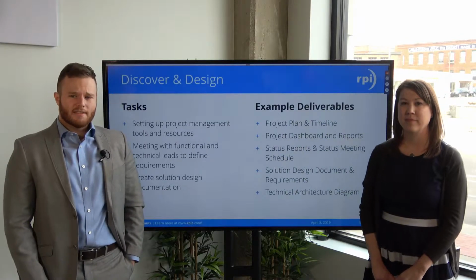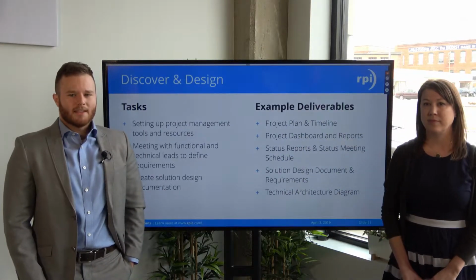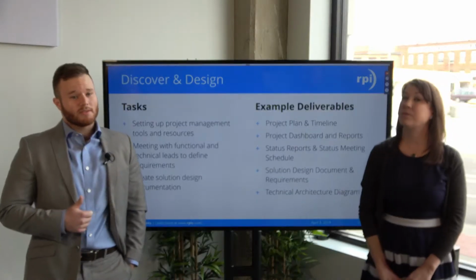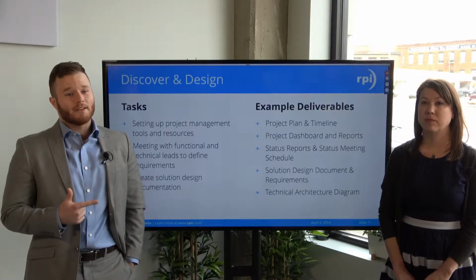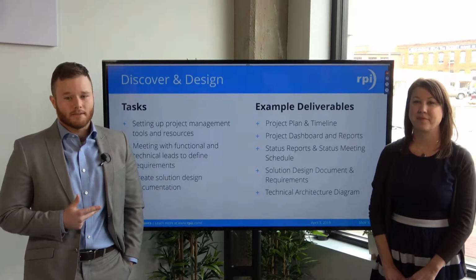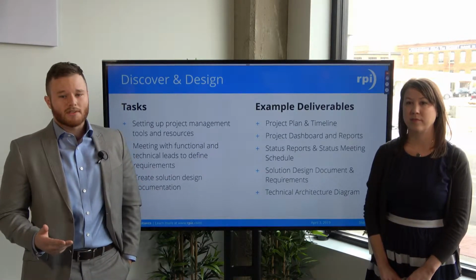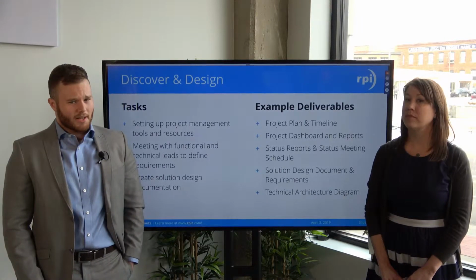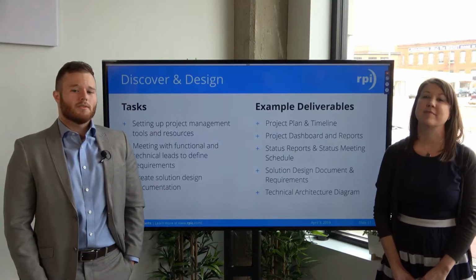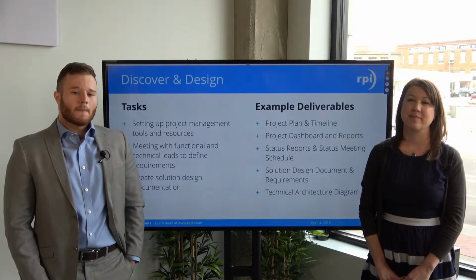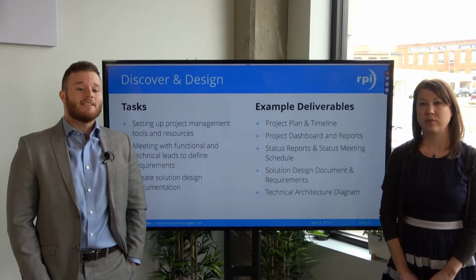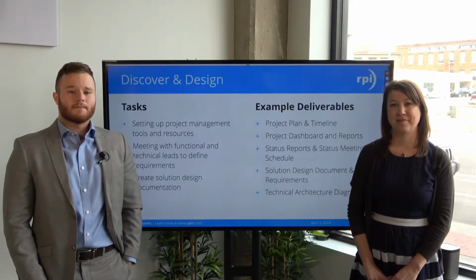The first project phase is the discover and design phase. Tasks that occur during this phase include setting up project management tools and resources, meeting with functional and technical leads to define requirements, and creating solution design documentation. Some example deliverables that a client may receive are a project plan and timeline, project dashboard and reports, status reports and scheduling status meetings, a solution design document and requirements, and finally, a technical architecture diagram.